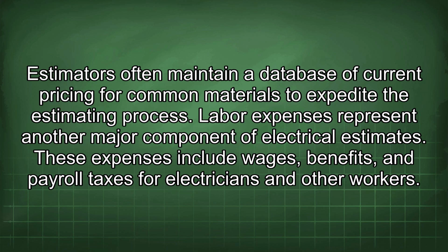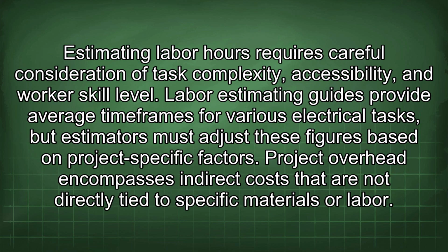Labor expenses represent another major component of electrical estimates. These expenses include wages, benefits, and payroll taxes for electricians and other workers. Estimating labor hours requires careful consideration of task complexity, accessibility, and worker skill level. Labor estimating guides provide average timeframes for various electrical tasks, but estimators must adjust these figures based on project-specific factors.